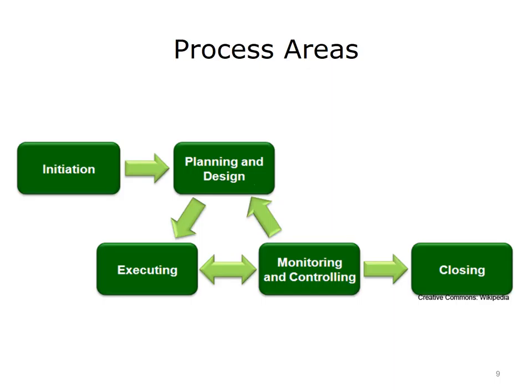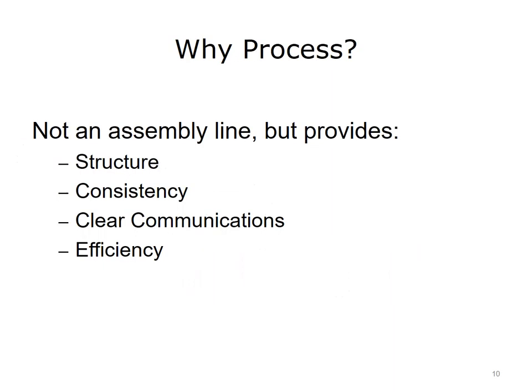During the implementation stage, the manager will target the project staff, process, activities, and resources toward the project objectives. The monitoring and controlling stage includes supervising this entire execution, while constantly reviewing the current outcomes against the project plan and defined baselines, and controlling for risk. Finally, the manager presents the final deliverable for client acceptance or approval during the closing stage, while finalizing the project processes and activities. A defined process technique is not an assembly line of automated steps. Rather, it provides structure, consistency, clear communication, and efficiency controls that improve the way you and your team work. It also minimizes risk and eliminates problems.